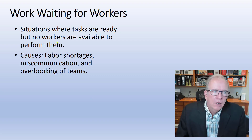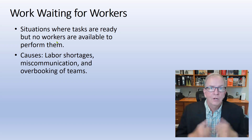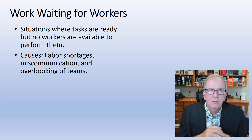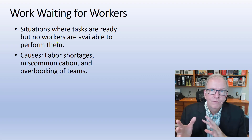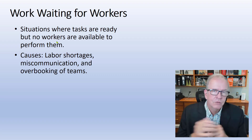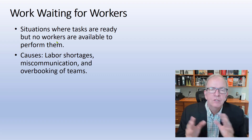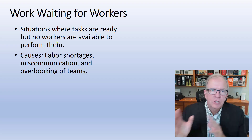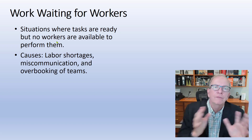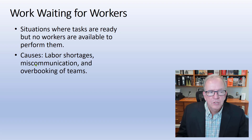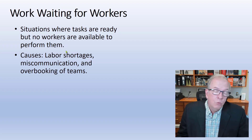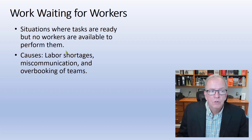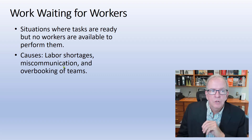Work waiting for workers is where tasks are ready but the workers aren't there. In busy economies like the Greater Toronto Area there's often a shortage of skilled construction workers, and you're trying to fit your schedule with trade contractors' schedules. You're much more likely to schedule work successfully when you don't have constant changes to your schedule. Some of it is labor shortages, some is not maintaining and iterating the schedule — and you want to give trades as much lead time as possible when things change.